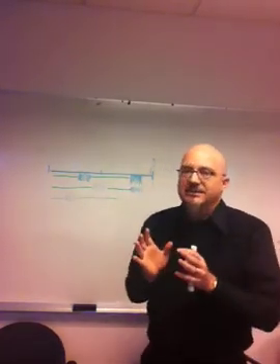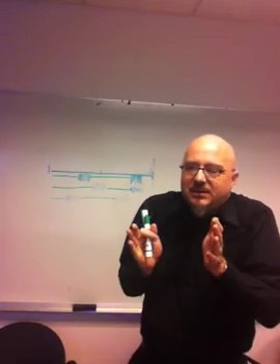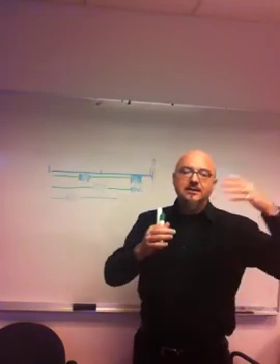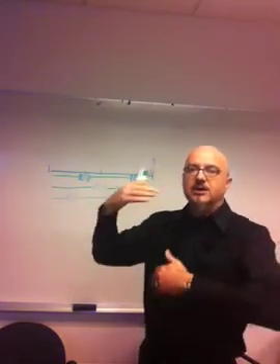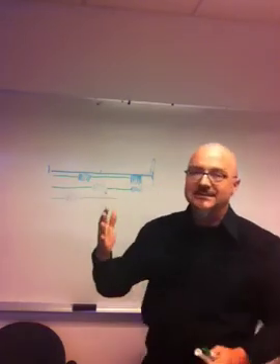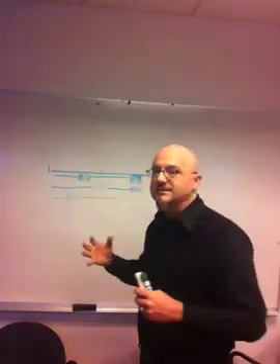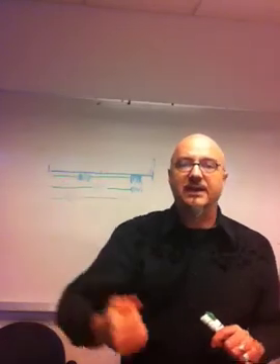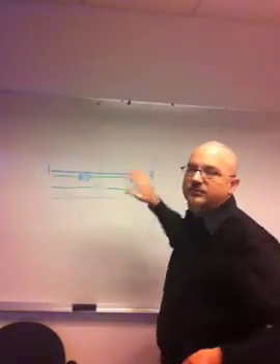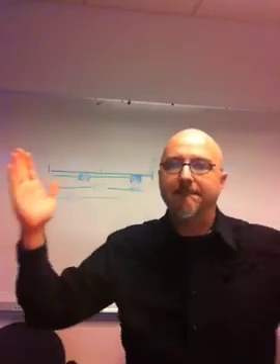We want to have a tiny little story that's going to take like a day to finish, and then the tester can start testing that. And then the next one comes in a couple days later so that the testing person gets a cadence going as well. So cadence isn't just for developers. Cadence isn't just for the release package, but cadence works for your QA people too. So your stories are too big, make them smaller.